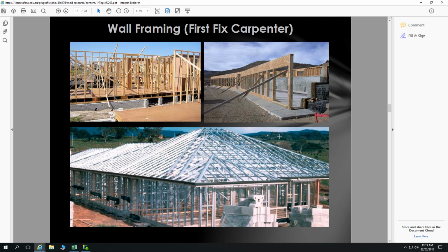So you do all your surface preparation, and then you get your curing compound on the top, and then you recommend 7 days before work on the top. And you always have to confront that sort of tussle between specifiers and engineers who are saying we recommend this amount of time before you work on that, and the project manager who goes, I've had this blowout, I've had that blowout, I've really got to get the framers on site in 3 days or something.